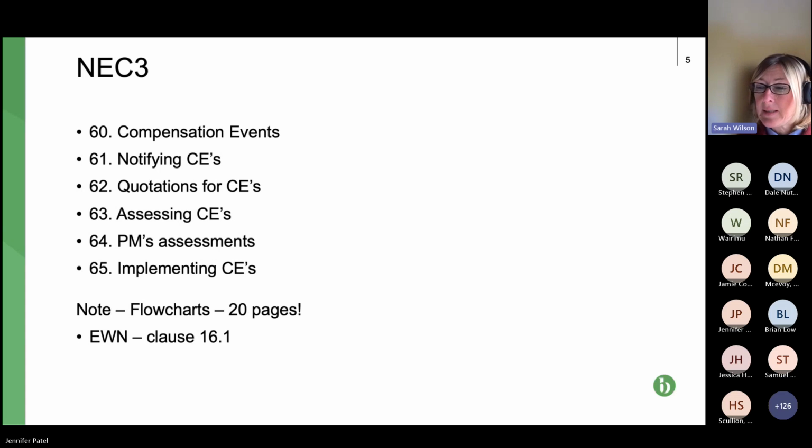So for example, 16 relates to materials, facilities, sampling that the employer or the client is providing for tests and inspections that the employer is required to provide. Providing it is all stated in the works information. So that's why that one is quite prescriptive.